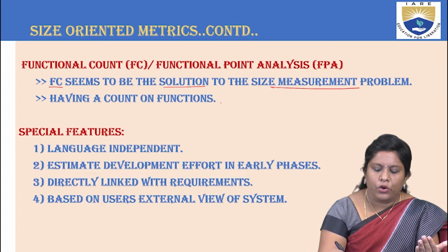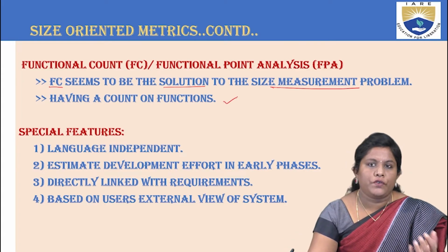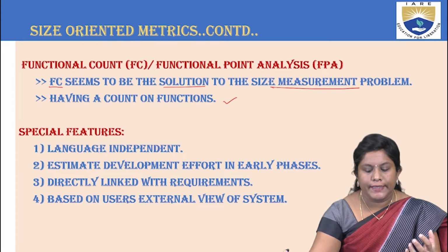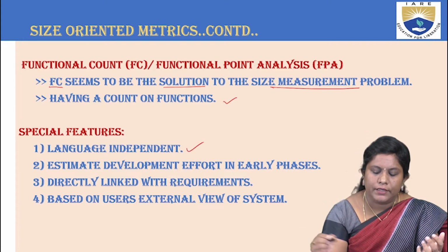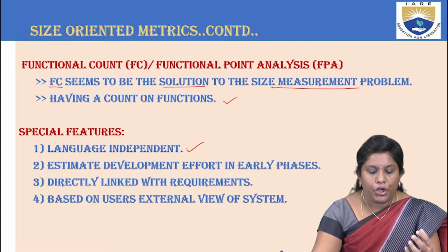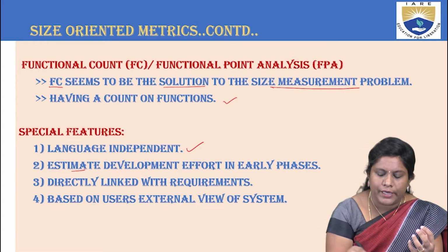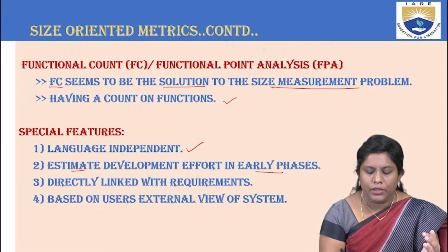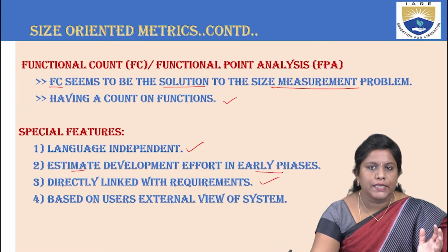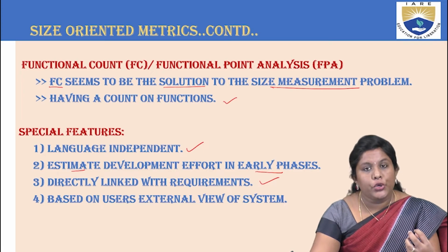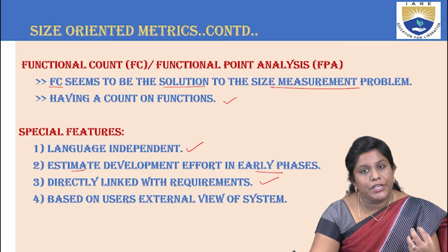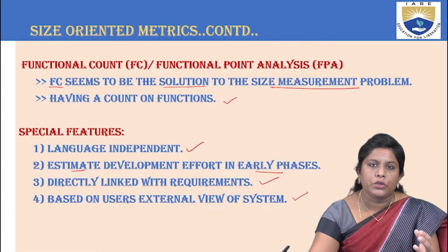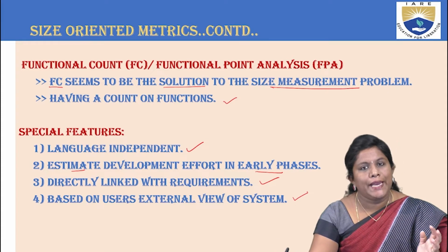And you can also count upon the number of functions. It has a few special parameters. What are they? They are language independent, and you can have a proper estimation in the early phases itself. And you can directly link them up to the requirements, is the third one. And the next one is that it is based on the user's external view, meaning the final end product, and it is trying to give you a picture in advance.